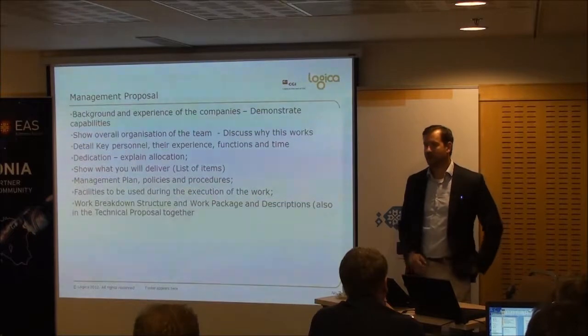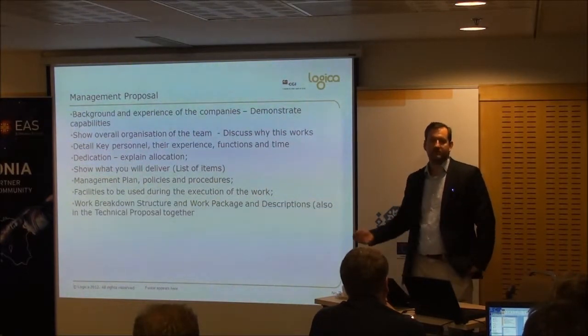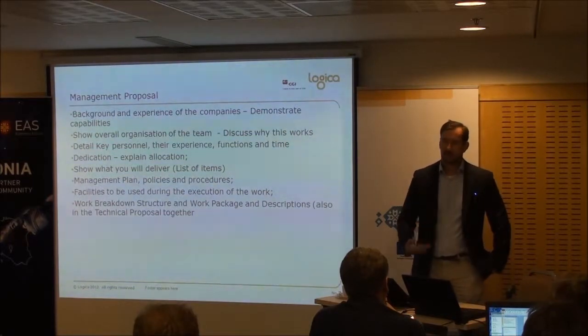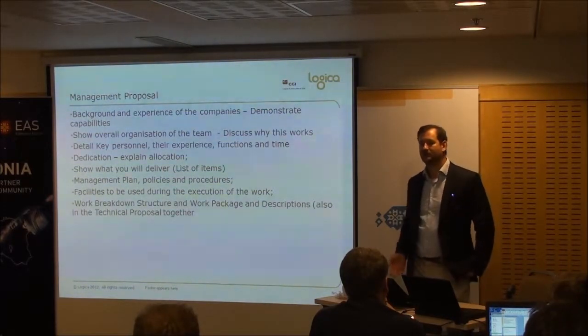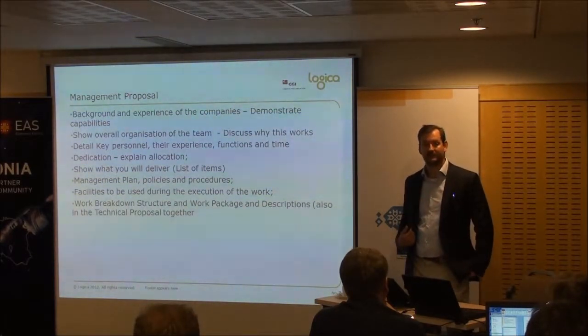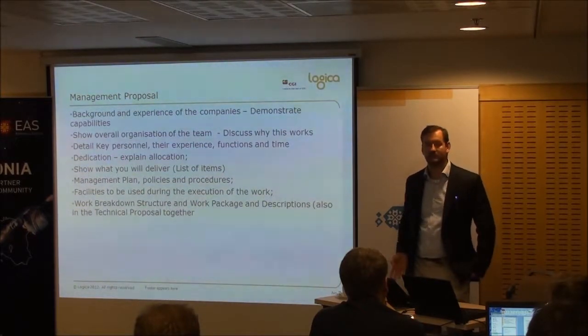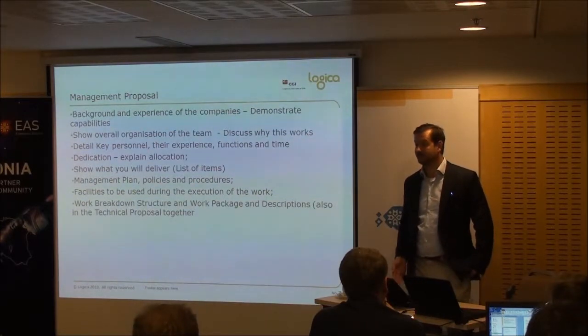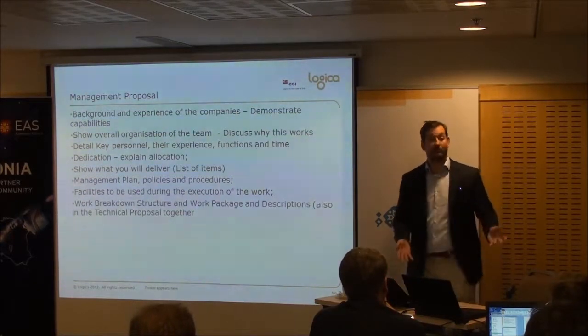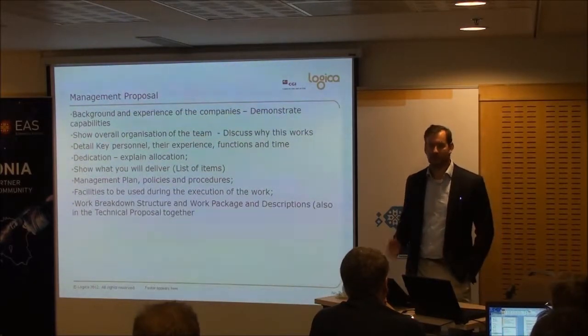Again, explain the allocation. If the guy's only 70% available, explain what else he's doing. Try and identify what risk could be around that and be open about it and how you're going to handle that. Because they'll think the question themselves. And if you're not clear, they won't even ask you a clarification. So as much information and as clear as you can be early on, the better. Because they'll just think, oh, they thought about that. It's a good place to be. If they're positive and feel strong that you're aware of these kind of challenges, it gives them a lot of confidence.